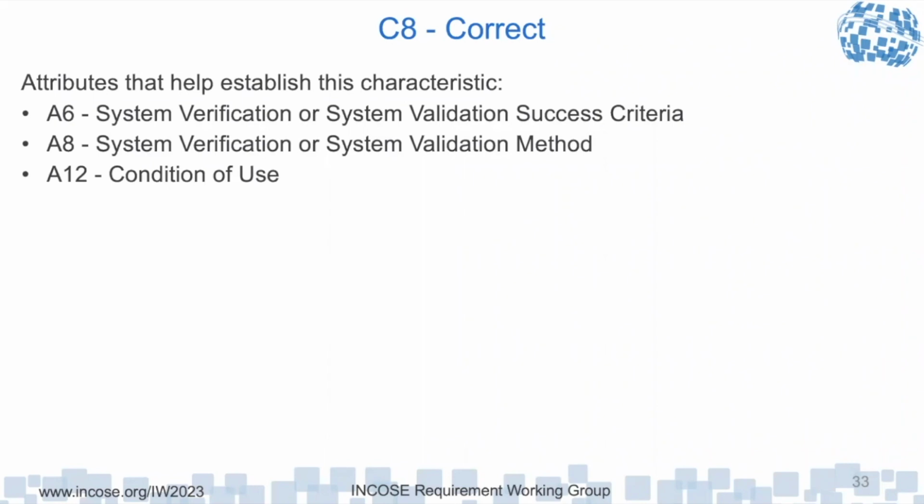Because we got handed that problem where the requirement said, shall comply with this standard. And the standard was 500, and it referenced numerous other standards. And there was absolutely no way we could verify that. It was literally impossible. We had to go back to the system and basically get them to list the real requirements that were contained in that. Yeah. And I worked with one master program where I brought that up, and so they assigned one of the engineers to actually read each standard and each requirement in the standard. And then she invoked only the ones that she felt were applicable.